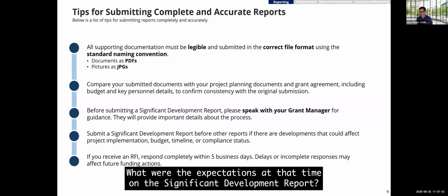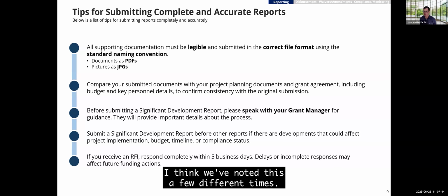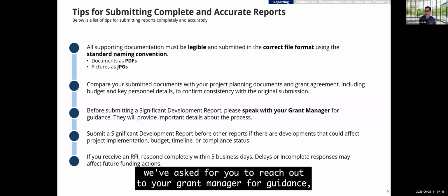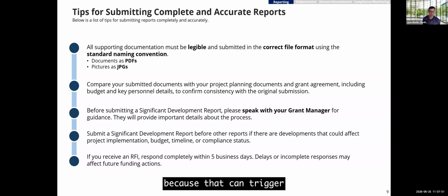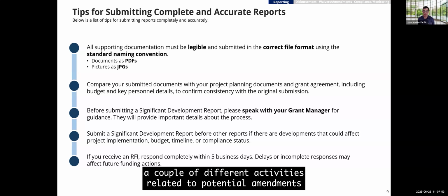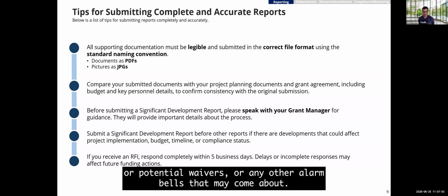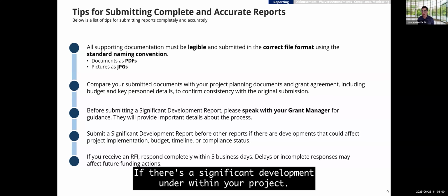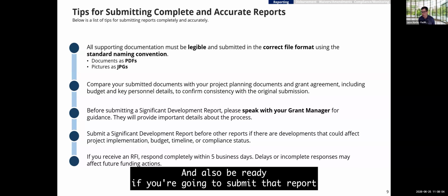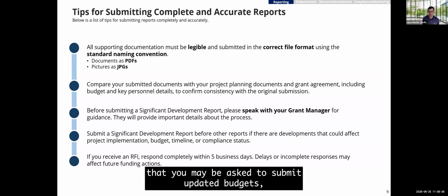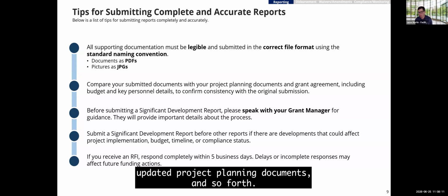On the significant development report, I think we've noted this a few different times: before you submit that report, we'd ask for you to reach out to your grant manager for guidance, because that can trigger a couple of different activities related to potential amendments or potential waivers or any other alarm bells that may come about if there's a significant development within your project. Also be ready, if you're going to submit that report, that you may be asked to submit updated budgets, updated project planning documents, and so forth.